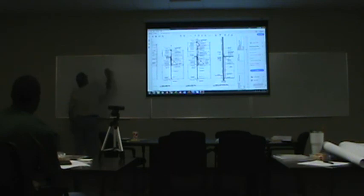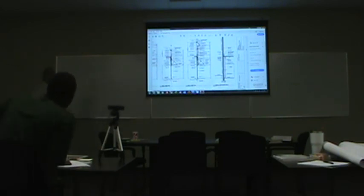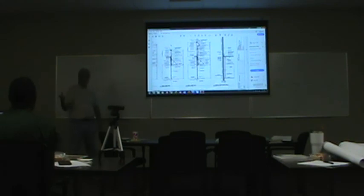How long did we say it was going to take to do the masonry? Did we even say that? I don't think we did. All right, just for the sake of the conversation, let's say it takes 20 days. All right, let's go 15. Easier math. Masonry takes us to 10/10. Then I think we said to put sheathing and metal stud and so forth up was going to take another 10 or 15 days. That was our critical path. We remember that. Let's just say 15 days. That takes us up to 10/25. We're sheathed out and we're ready to roof. We said that roofing was going to take 5 days, so that takes us to 10/30.